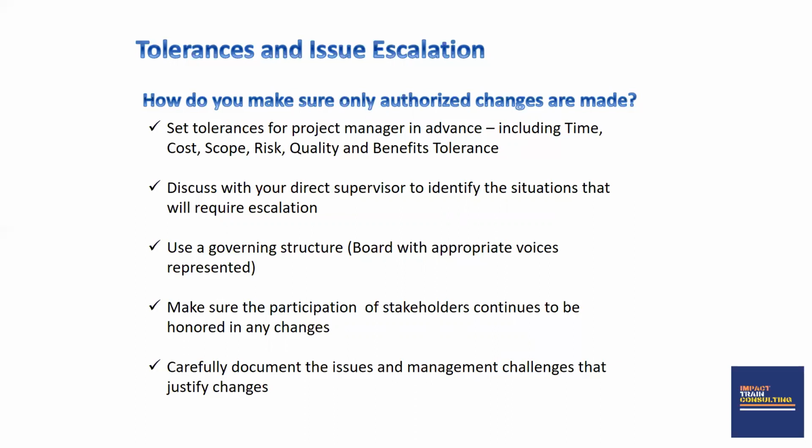Most times in our projects and in most organizations, the only tolerance levels that they set for project managers are the financial tolerances, whereby they tell you that as a project manager, you are able to spend or approve checks or expenses that are up to a certain amount of money. That whenever it is above that amount of money that has been given to you, you need to seek the approval of another person who has a higher approval limit than you.